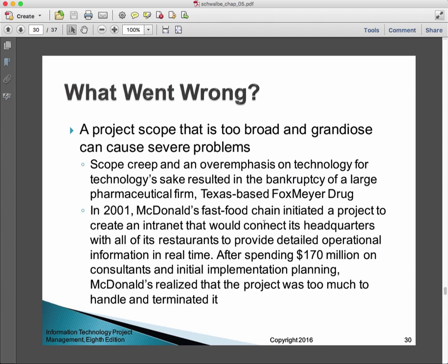Maybe everybody could be convinced to make this a bigger project, but a lot of this scope creep happens while people are not keeping their eye on the overall goal as they're adjusting what's going to be in, what's going to be out. There are a lot of good ideas, and you can pave your way to project failure by only considering whether the idea is good or not, and not considering whether it fits in your current schedule and budget parameters.